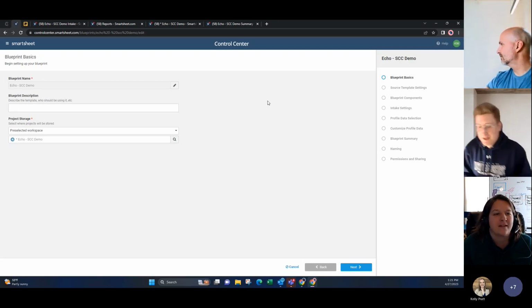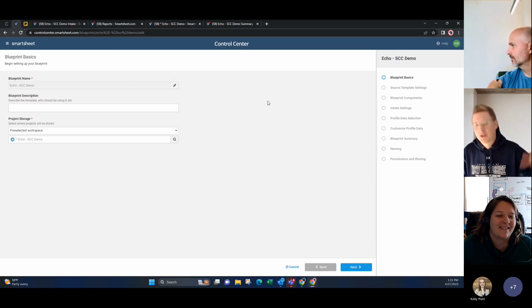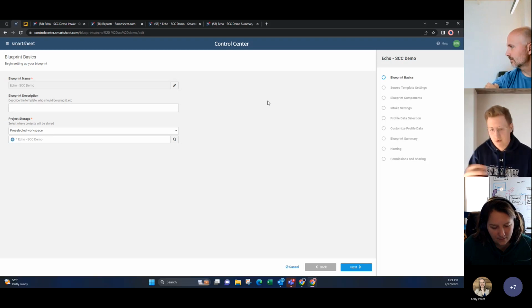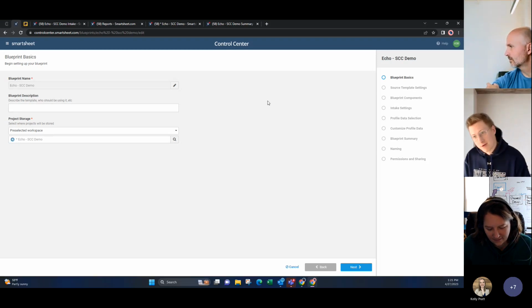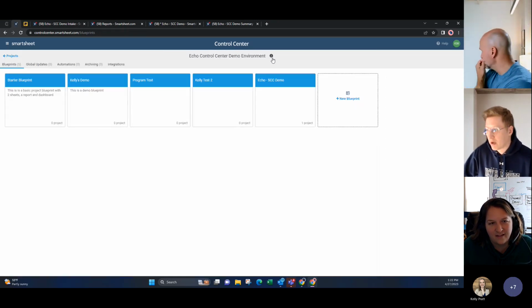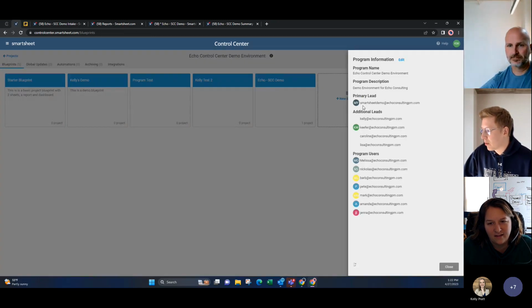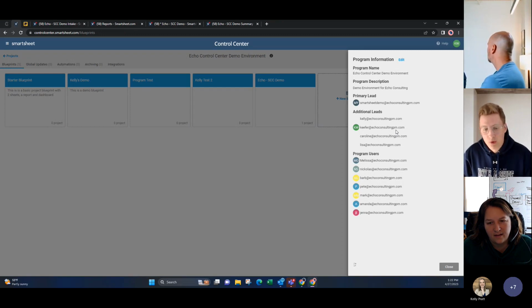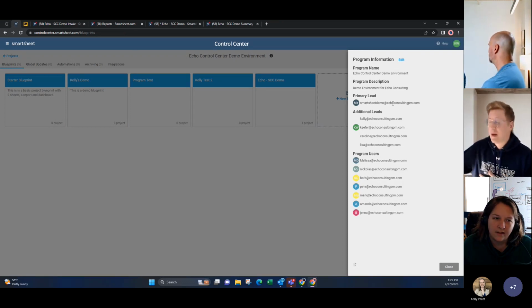Yeah, and that brings up another tidbit, which is the projects just land in the workspace. You can't put them into a folder, right? So they just land as the folder in the workspace. And then another tidbit, anything tied to your blueprint needs to be shared with your primary lead. So for us, our primary lead is this demo account. But any asset that you are going to use, whether that's the workspace, the template, the intake sheet, they all have to be shared with the Smartsheet or the primary lead within your Control Center solution.